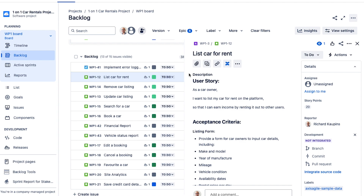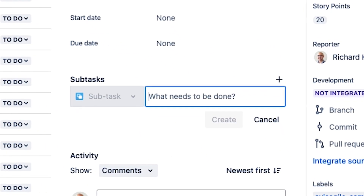For example, one team has an item on their Definition of Ready stating that the solution architect has had a chance to review what they're doing. The Definition of Ready helps the team think about what criteria needs to be met for a product backlog item to be brought into a sprint and work begun. Now that you know what a Definition of Ready is, let's look at how we can implement it using Jira.